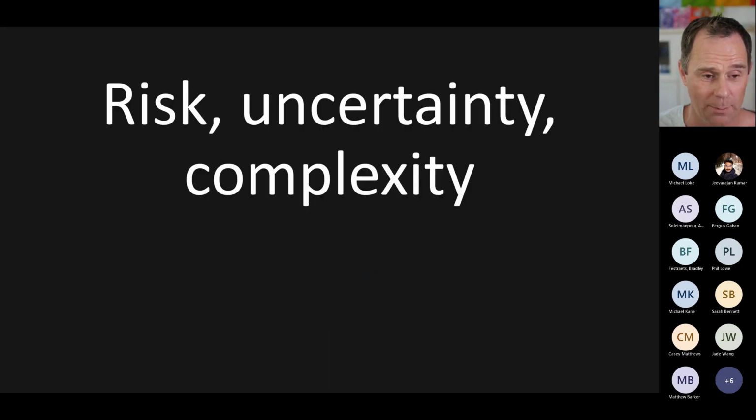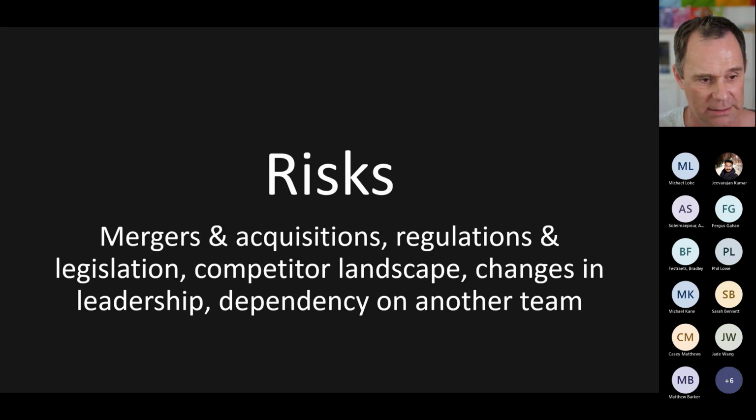What we see with requirements is risk, uncertainty, and complexity that affect how long it's going to take. So risks could include merger and acquisition activity within your customer's organization. If they get bought or they buy another business, or the government flags changes in the regulations or the legislation that might affect the customer's industry, or a new competitor emerges, or there's changes in the leadership, or you have a dependency on another team, which quite often is a risk that affects a lot of our work. Maybe you've got an integration team that is building APIs for you, and you've got to wait for those APIs.